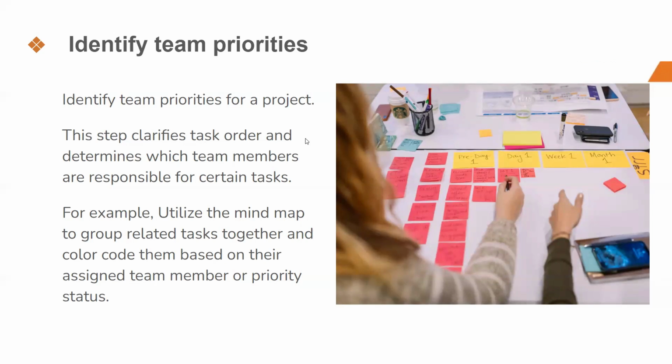So we can identify the priorities over here. Then we can see how much time it will take, allocate it, and see how many things can be done simultaneously, because if you start with one of the pages, other things can be on hold. This is the place where you identify and initiate the work. It will give you a proper timeline for when you can take things. If you look at the image, like 3 day, pre-1, pre-week, that is like the same Gantt chart, which will take you from your backlogs to your sprint 1, sprint 2, and onward.